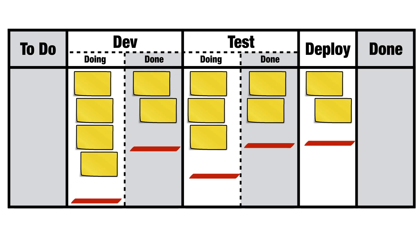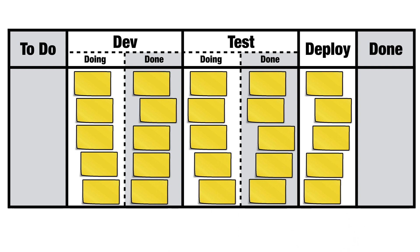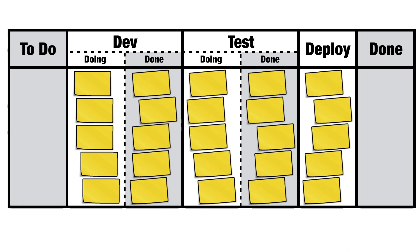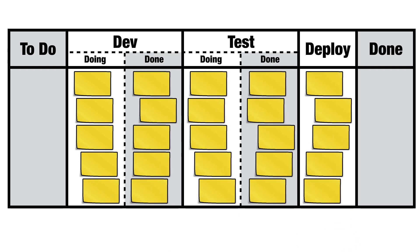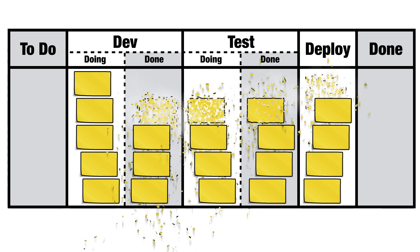Why is it important? Why should we move work through the system as quickly as possible? Think back to the coffee shop — if we take too long about it, the customer could change his mind. Can a similar thing happen in our development world? Yes, of course it can. Let's take away the WIP limits for a moment and go crazy with the post-its. What if something comes to light that means all of these have to be reworked? Or what if we learn something that makes them all irrelevant? All the development time and money that went into these items is now down the drain — a waste. Clearly, those work in progress limits are a big deal.